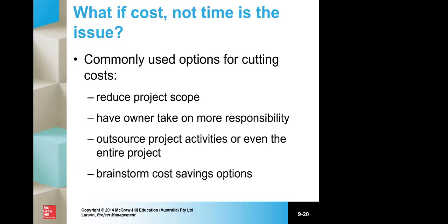corporations and governments revise all their internal financial plans, and they may say, we have to save 10% of our outgoings, and we're doing that by looking at all the projects we're going, and each of our projects has to have its cost reduced by 10%. That's how these things happen. And they might say, well, we're happy to reduce the cost by 10%. What we'll simply do is we'll roll them over longer. So we're happy to make that trade-off between costs and quality.